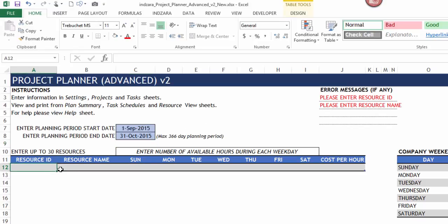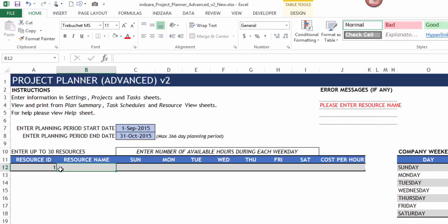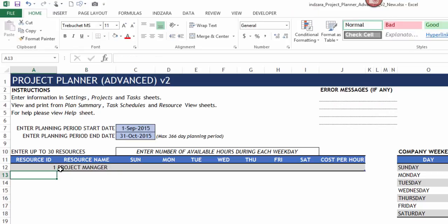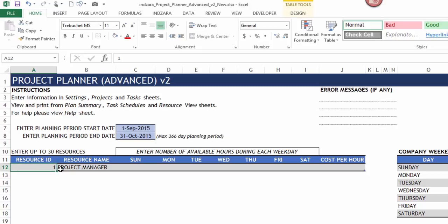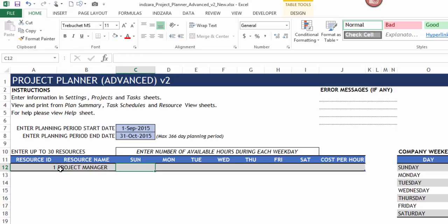The next thing is entering resource information. I recommend putting in resource IDs as simple numbers: 1, 2, 3. For the resource name, in this case I'm entering the type of role rather than a person's name, but you can enter the name of the person on your team. The next few columns are the number of available hours for each resource for every weekday.